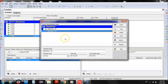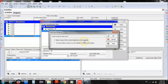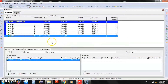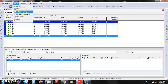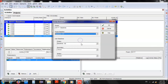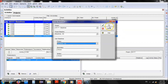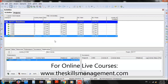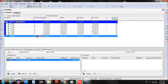Because the new activity was not part of any previous baseline, we need to repeat the steps: go to Project, Maintain Baseline, click Add, save the current version as B3, click OK. Then go to Project, Assign Baseline, and instead of B2 now select B3 as the current baseline. Click OK. Now in the baseline columns we can also see the new activity that we just added.